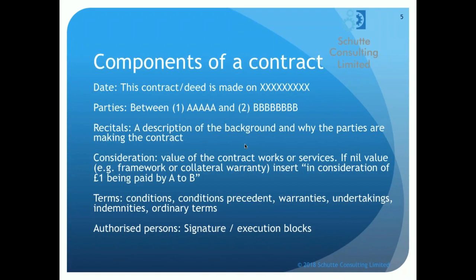We need to have a consideration term, and again, reference to webinar 1 here as to the importance and necessity of consideration to making a contract. In many cases, that will be the value of the works which are being provided or the services which are being performed. You can have contracts at nil value, such as in a framework situation or collateral warranties, where no